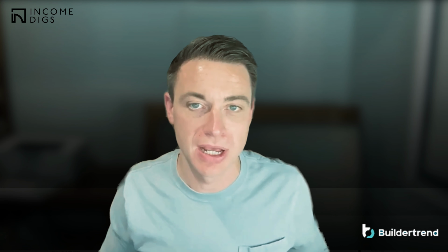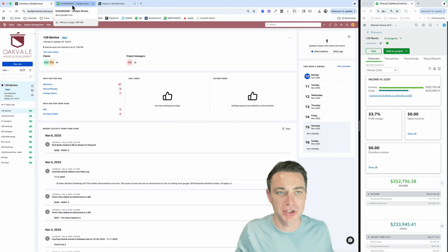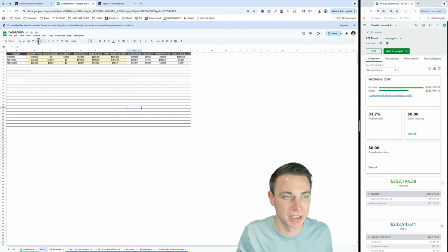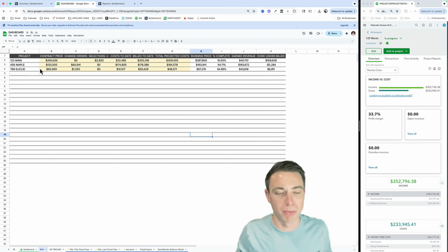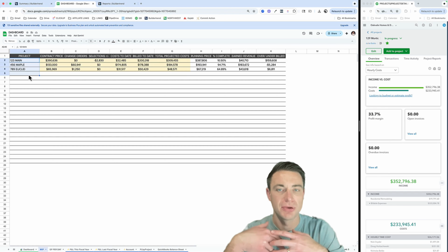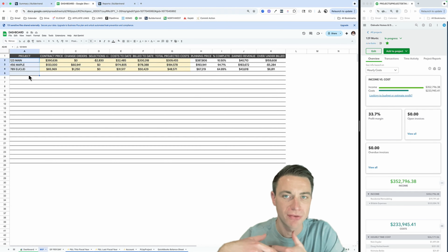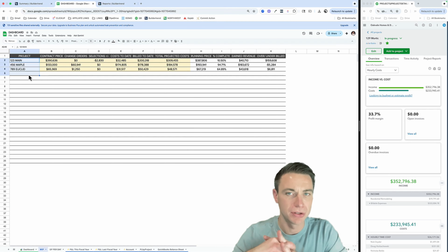Let's get into it right here in Buildertrend, the new report that is up here, and it is the WIP report. So what are we talking about with WIP? Let me just go into Excel or Google Sheets real quick to say what we're talking about. Work in progress means we've got a project, and at certain points in time we're invoicing for that project, but we're incurring expenses. And sometimes we over invoice or under invoice. So work in progress is a way for us to reconcile that out to show real revenue in our books.